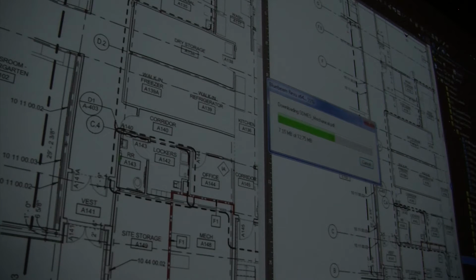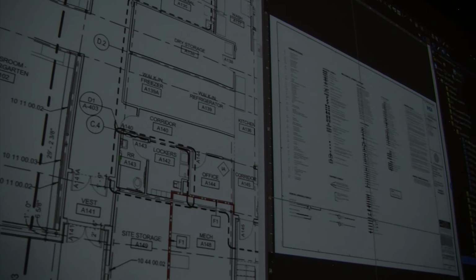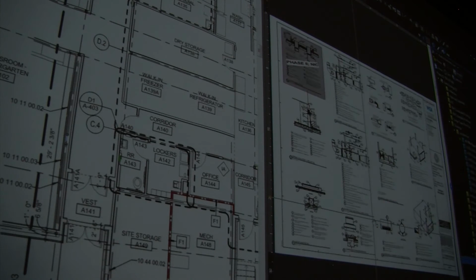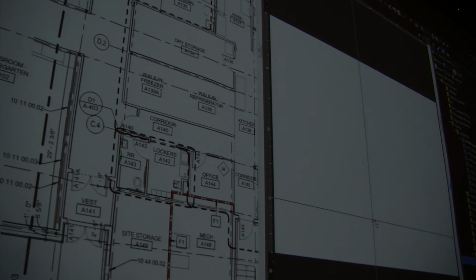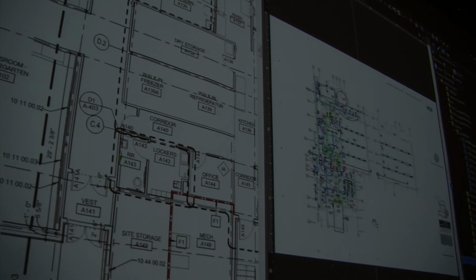Even with the systems. Lots of our CMAR projects, the owner and the design team will say, okay, do we do a 4-pipe fan coil system? Do we do a VRV system? Do we do evaporative cooling? And it's our job to come to the table with the cost for each one of those, plus the life cycle cost. Some of these systems are very cheap up front to install, but over a 50-year period, you're going to lose a lot of money. There's always that sort of back and forth negotiation, especially with design build or construction manager at risk or integrated project delivery.